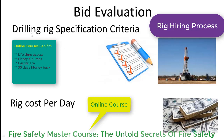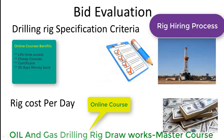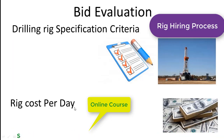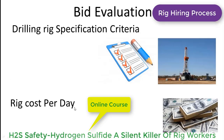During bid evaluation, they will assess which proposal from the different rig contractors meets their required drilling rig specification. They will check the specifications for different contractors and find out which rig is the most suitable for them. They will also look at the rig cost per day — the daily operational rate, standby rate, and mobilization cost.